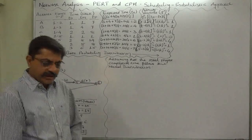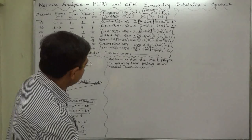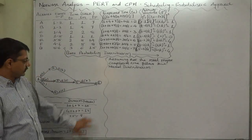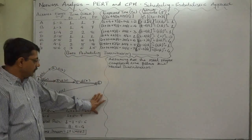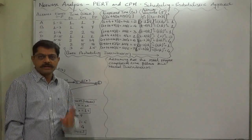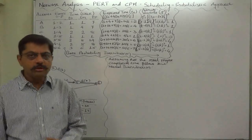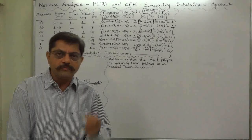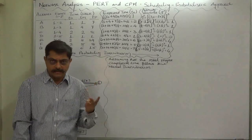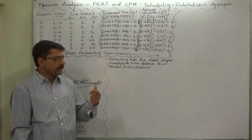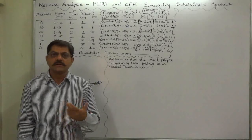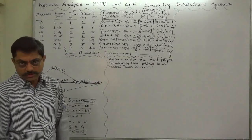To calculate the probabilities assuming normal distribution, we need to calculate the z-score, and to calculate the z-score, we need two important things: one is the mean time duration and the other is the standard deviation of the time duration.